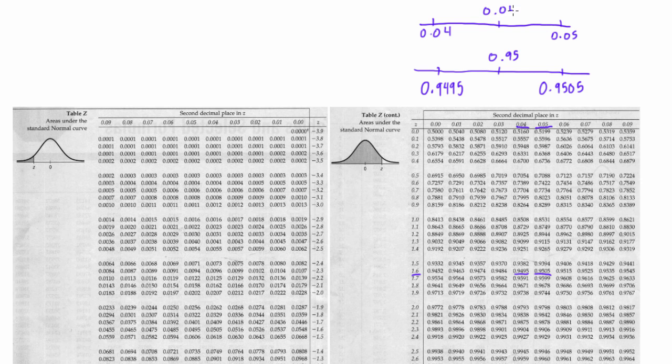You can do linear interpolation or you can just kind of rough your way through it like that, but the point is the value that we're looking for—the z-score that corresponds to a 0.95 probability—is 1.645.